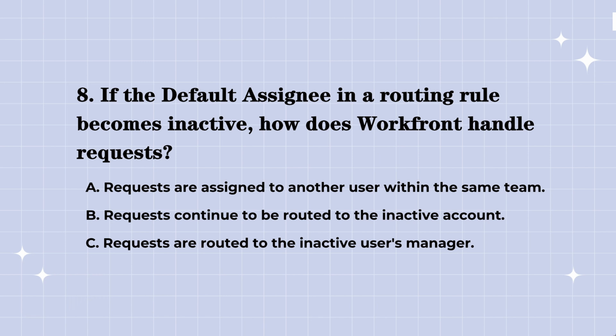So, the correct answer is: if the default assignee becomes inactive, Workfront still routes requests to their account. Admins need to update routing rules to redirect requests to active users.